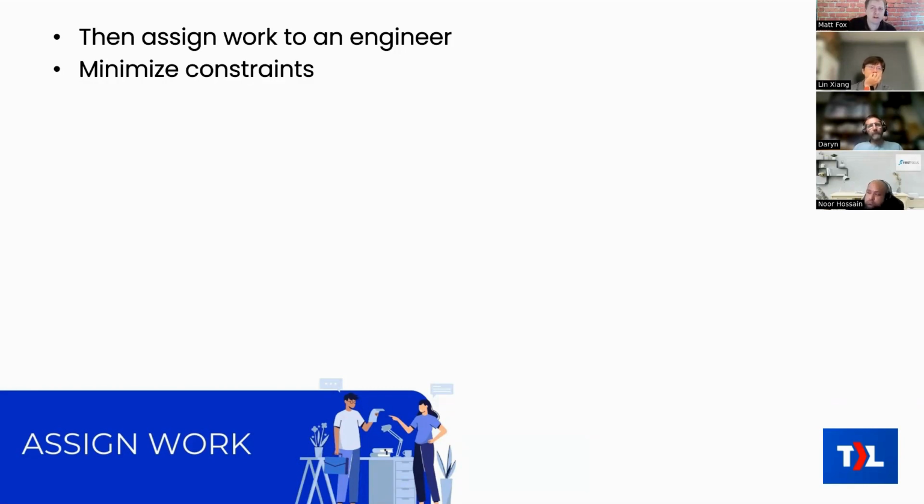Now, I know that is hard to achieve, and not a lot of MSPs are actually able to do that. Typically, you would have certain engineers that are more familiar with certain projects or certain customers. But the more that you can document things and cross train within your team, the more flexibility you have to assign any engineer to any project. And that's a good benefit. That's going to help your projects run a lot more smoothly, especially when things don't go according to plan. If you were planning to have one engineer do a certain ticket, and all of a sudden they become unavailable, other engineers can just pick up that work without too much trouble, and that project keeps moving forward.